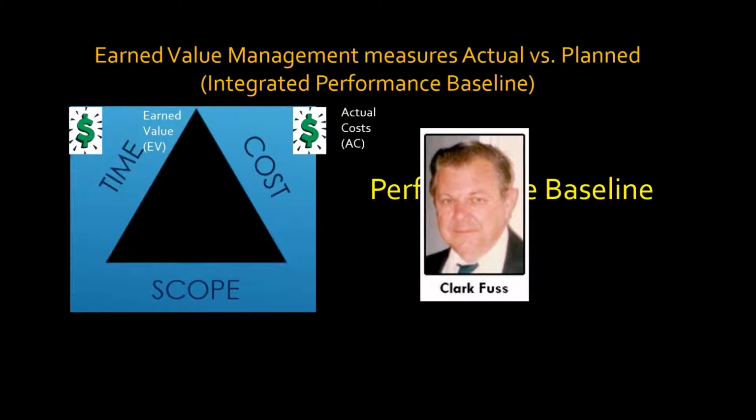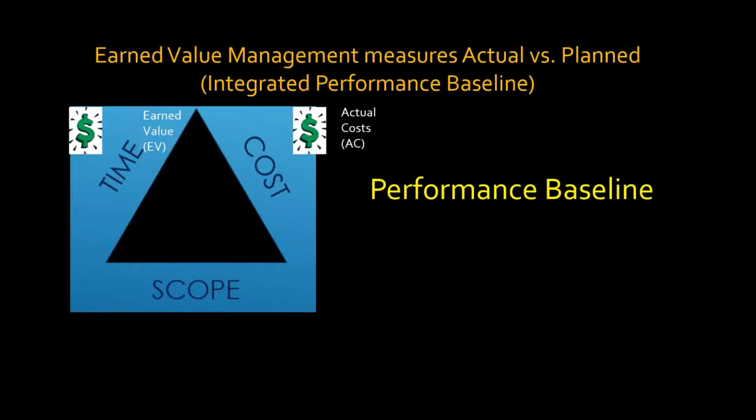When I'm measuring earned value, I'm measuring work that's actually been completed, not work that's supposed to have been completed. All right, that's the key here. Now, those two will both plot over time. My earned value continues to go up as I complete more and more work. My earned value gets bigger and bigger until I've eaten up the entire budget of the project. I'm finished.